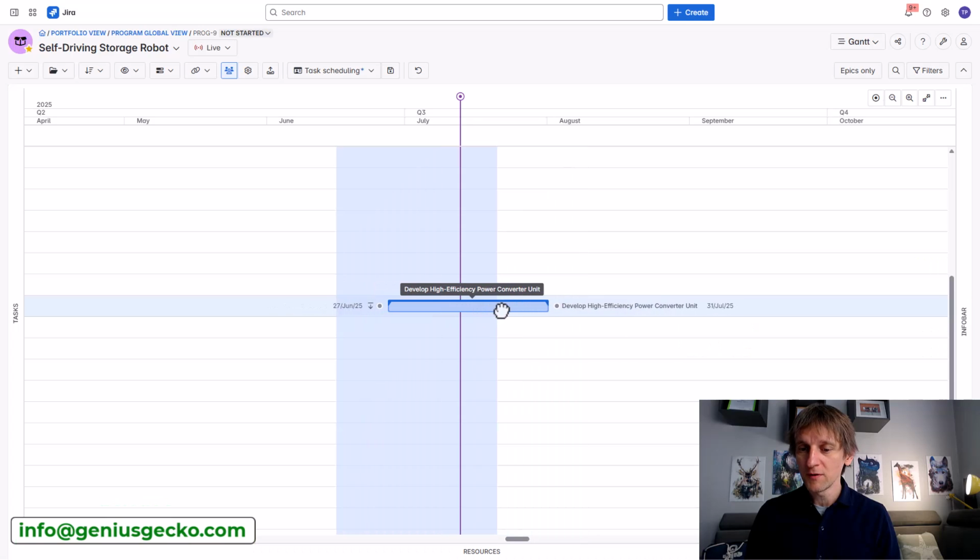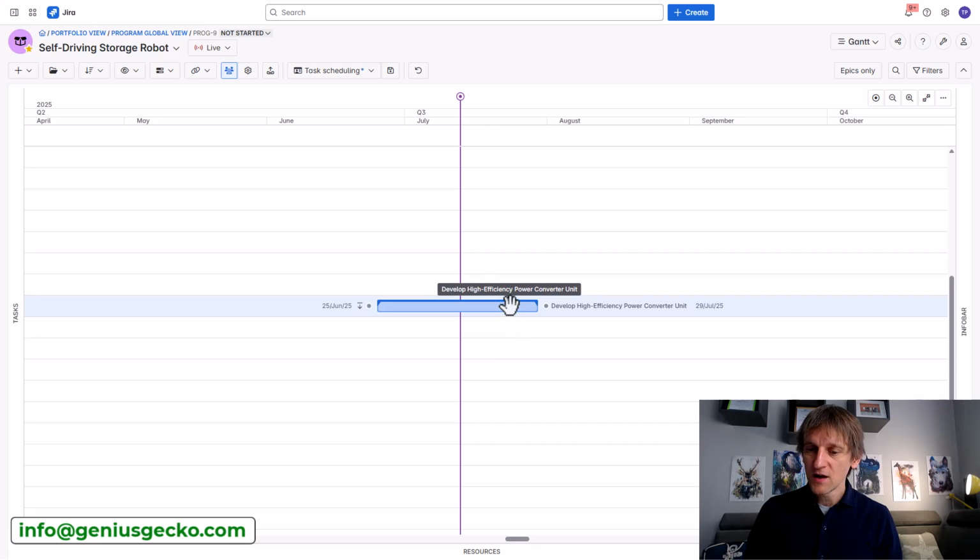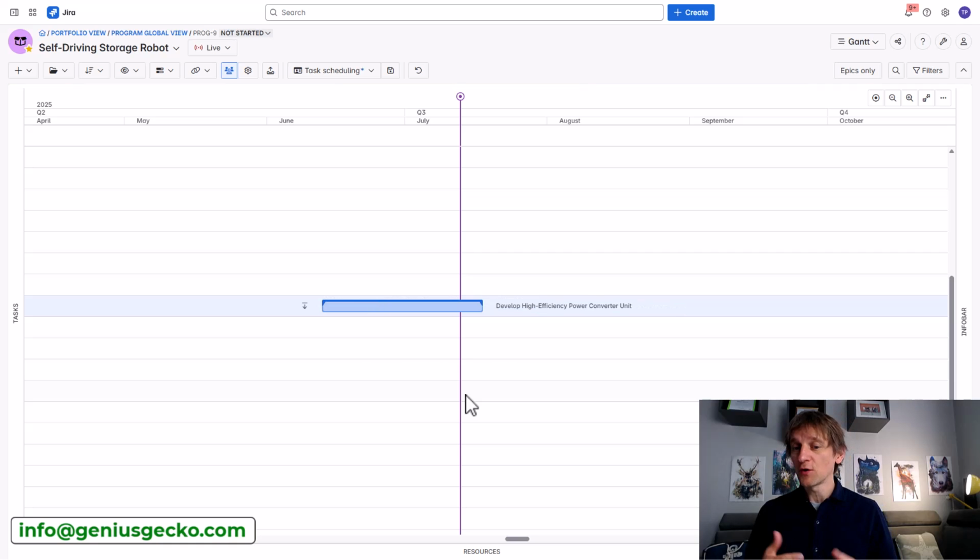And if your project team is pretty decent and there are some problems with delivering this task successfully, you will probably learn about those problems somewhere here. Okay? And that's if your project team is good. If your project team is bad, you will probably learn about those problems somewhere over here. And that's something that you don't want to have, because unless you have a big cushion for all the things that can go wrong in a project, you're basically screwed at this point, right?